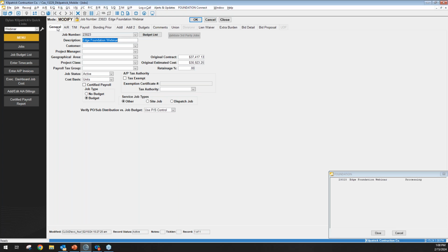So this is kind of that first step in moving from the estimate to foundation accounting and pushing that information over so that we can do all of our entry and make sure that we're only hitting budgeted items. We're making sure we're not going to do duplicate entry no more, and we're going to make sure that the entry is coming over properly, because usually when we're doing a manual entry, there's a chance that we could make errors as well. And that will hit all of your job cost reports, be able to pull budget versus actual, job cost dashboards, executive dashboard, so on and so forth.